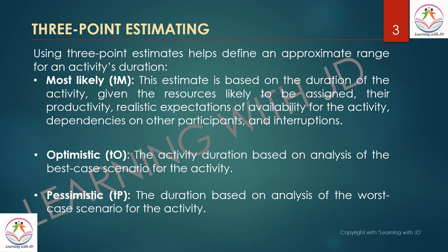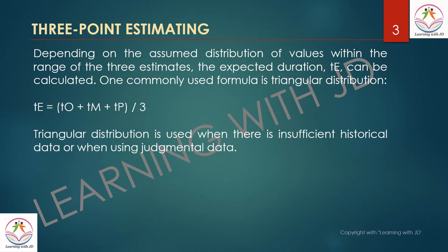There is a formula to find the three-point estimating value, which is TE (time estimate): TE = (O + M + P) / 3, where O is the optimistic figure, M is most likely, and P is the pessimistic figure. Using our example: (5 + 12 + 15) / 3 = 32 / 3 = 10.66. So as per three-point estimation, you will finish this activity in approximately 10.66 days.